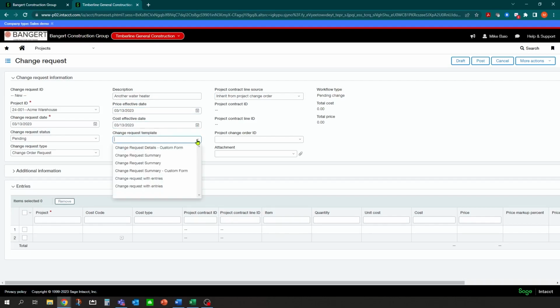And we can have a particular change order document. Again, you can send out the actual document to the owner to sign. And we'll just select this one for now. And then who do you want to send this form to? So you can actually send out the change request form for approval out to this individual contact or company. We'll send it to Grocers Association.